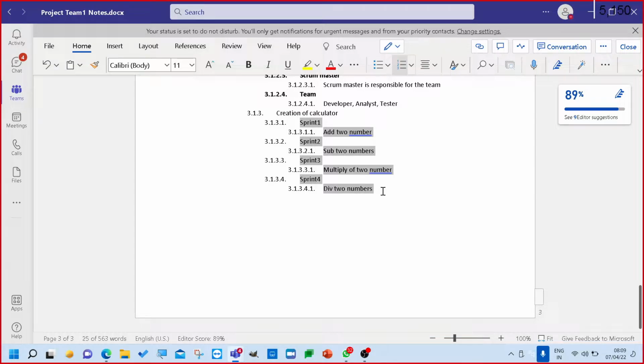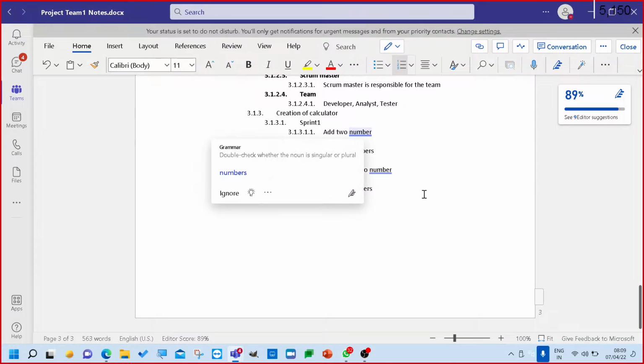We follow agile methodology, with a 15-day timeline, and we have a task to complete that is assigned by our scrum master, and we maintain all the tasks in ADO or in any GitHub. That's where we track our project. After completion of all the items, we will deploy. So every week or every 2 weeks there is a production deployment. So after adding of 2 numbers, deploy this.